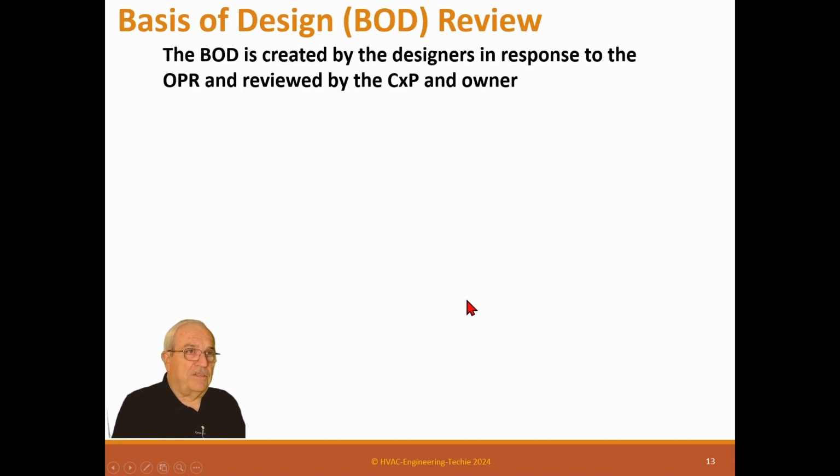A basis of design review. Now, many people are really confused about a BOD. The BOD is created by the designers in response to the OPR and is reviewed by the CXP and the owner, but is not created by them. The BOD is created by the designers.